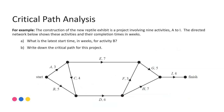Let's now look at an example where we can do all of that process together. The construction of the new reptile exhibit is a project involving nine activities A to I. The directed network below shows these activities and their completion time in weeks. Firstly, what is the latest start time in weeks for activity B? And secondly, write down the critical path for this project. In order to find the latest start time, remember that later start times refer to your backward scan, so we need to go through our whole process.